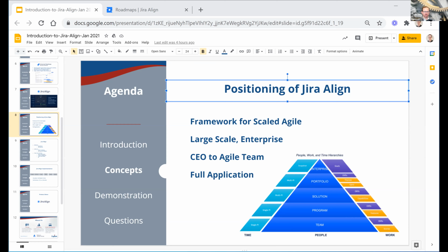Another question here around the syncing between Jira and Jira Align: is it syncing with another field, or is it using the parent link? The parent link field is just something that's used within Advanced Roadmaps to go up from the Jira epic to higher level work items. That parent link isn't utilized in the connector.